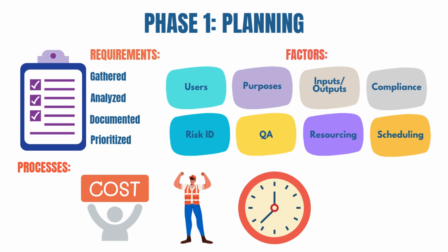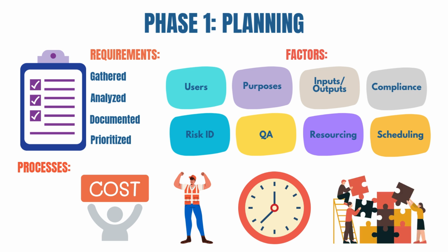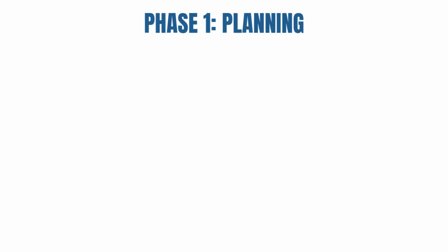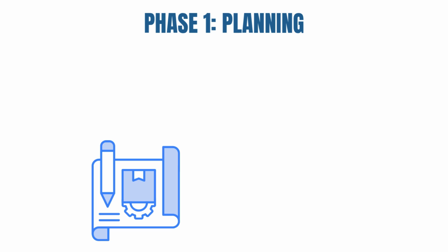Also, project teams are identified, and roles of each team member are proposed. If stakeholders are struggling to define requirements, often the development team may produce prototypes during the planning stage to tease out those requirements. A prototype is a small-scale replica of the end product used to get stakeholder feedback and establish requirements. A prototype is used to test basic design ideas.